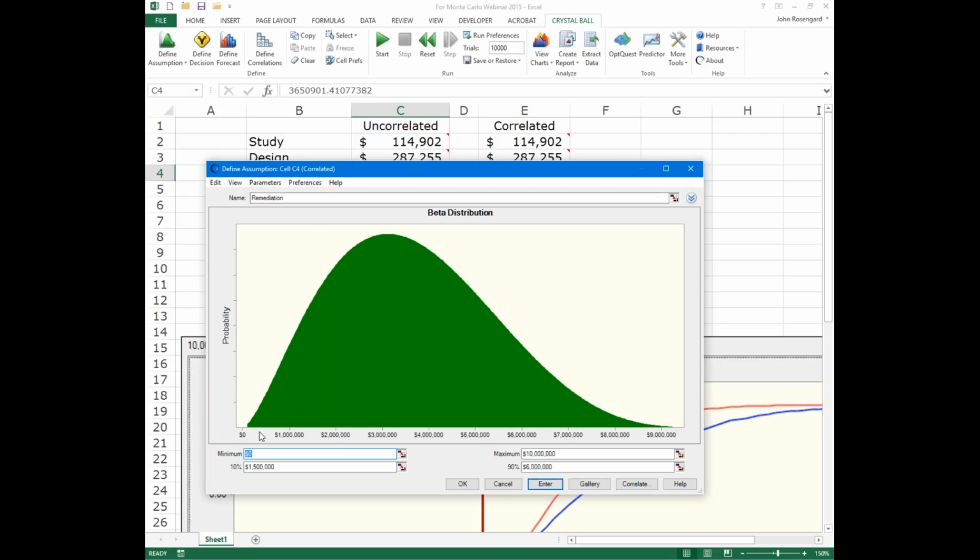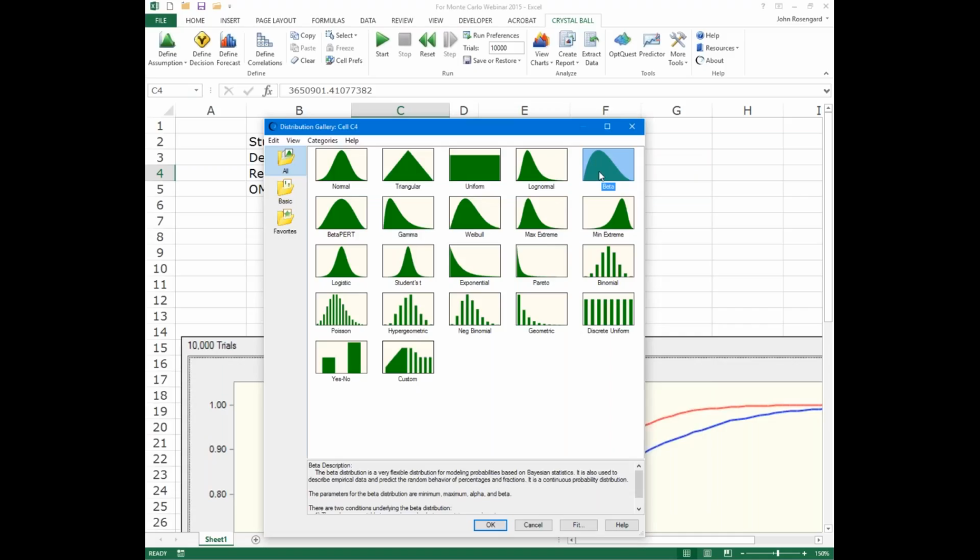But the way we're using it here is we're using a beta distribution and saying that this type of distribution, and again, we've got several to choose from. We chose beta because that's, generally speaking, how money behaves. Log normal, Weibull, beta pert, those are other examples of the ways that money behave. They behave as these sorts of distribution types. Money does not behave as a normal distribution as much as you might want it to, or as a triangular or uniform distribution. Money doesn't act that way, but that may be the basis of some assumptions that you have. Just keep in mind what your results will look like is they'll probably wind up looking like a beta or a Weibull curve, and each one of these curves, again, has different science behind it about how they're calculated.